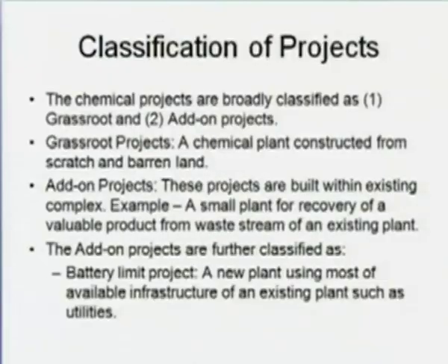It was built on land that was partly agricultural and partly hilly and barren, and then you have to see to it that it gets a proper feedstock from various sources. Then you have to go for infrastructure development: water, power availability, housing and educational facilities for your personnel. However, every greenfield project may not necessarily include the development of the entire infrastructure. Therefore, at the start of the plant, you can postpone some of these activities to a later period of the project. So that is the grassroots project.